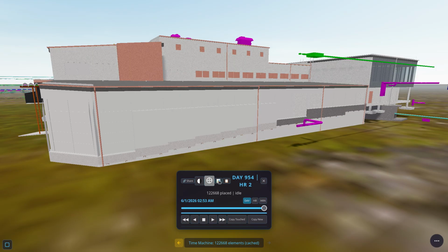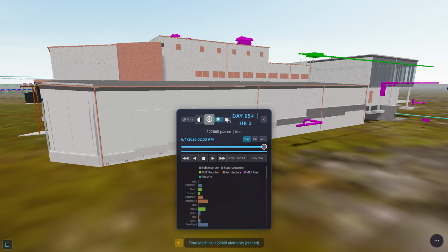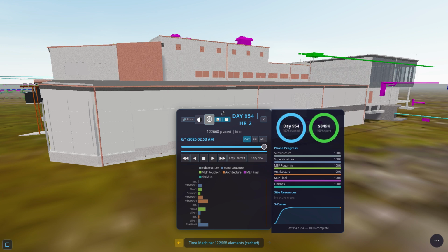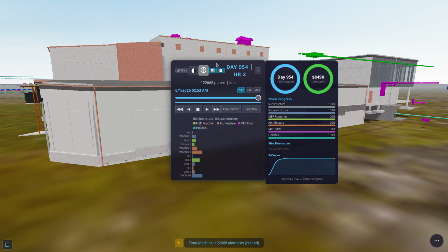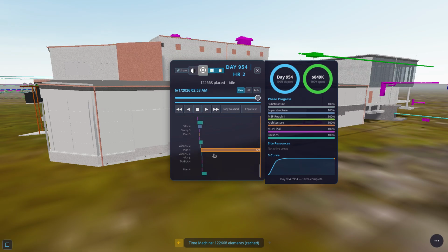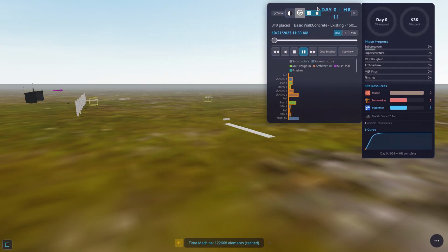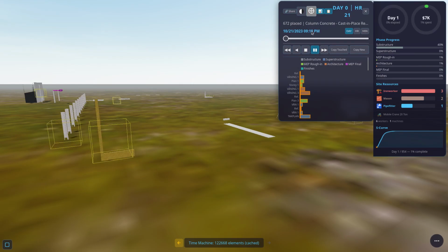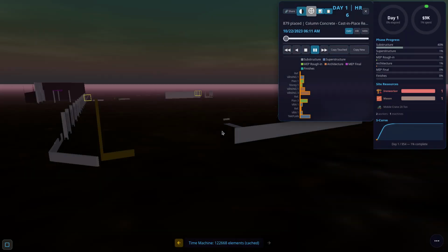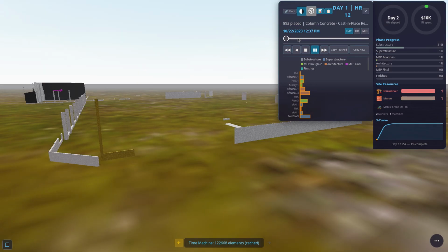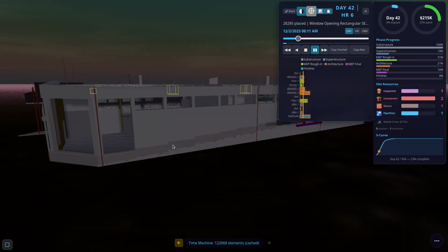Now a Gantt chart schedule can be made, can be edited, or can be defaulted, in the sense that we know foundation goes first, then slabs and beams and material, so there's a general sequence. But the engineers could do this anyway, and so will the accountants get the costing. And we can play it out in the time machine. This is what BIM engineers will love. This is called the 4D scheduling, and you can even have the sky animated. You can scrub the timeline very easily.